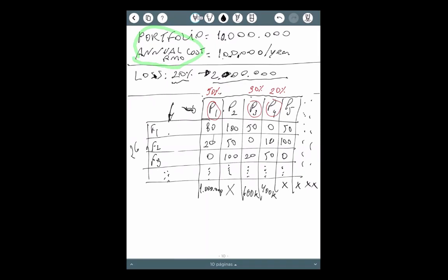That's it. So now look what you have to do. We will see which functions were selected in step number 2. Let's suppose that we have selected function 1, function 2, and function 3. Only these 3 functions, okay? So look, function 1 can solve my problem 1 with 80% of chances. Function 2, 20% of chances, and function 3, 0%.